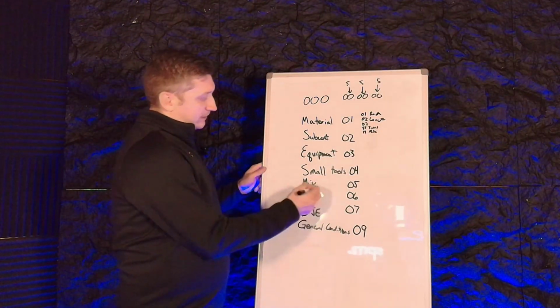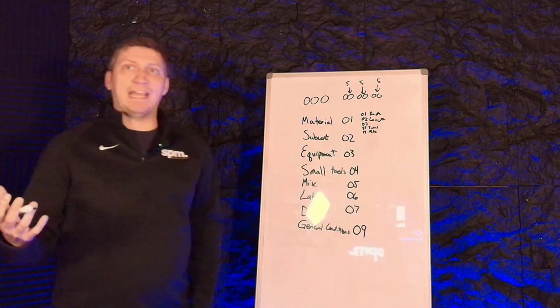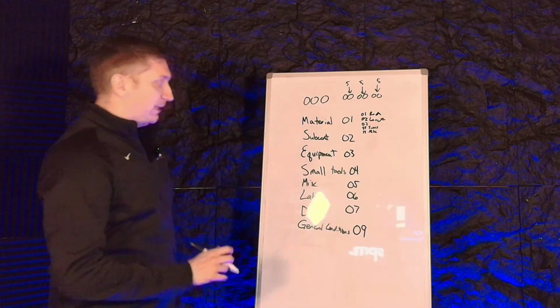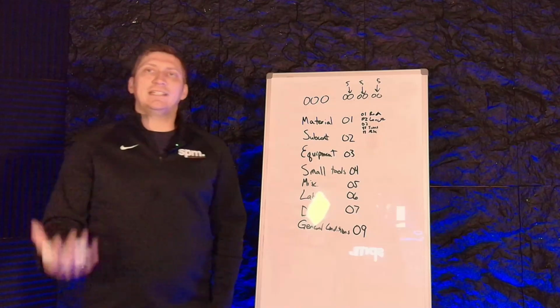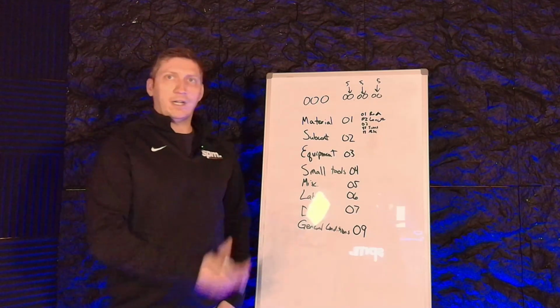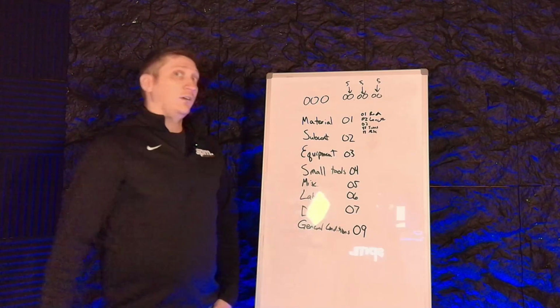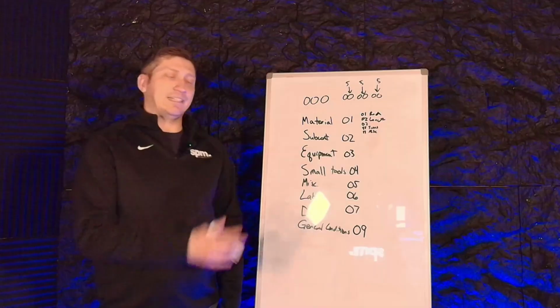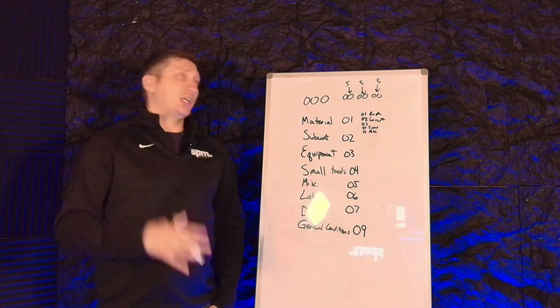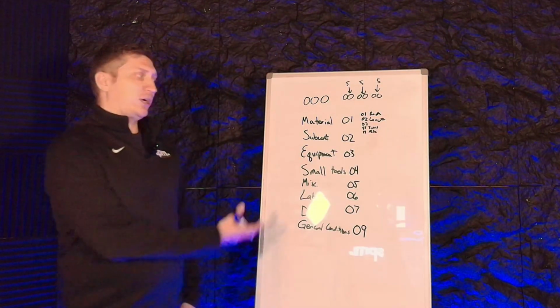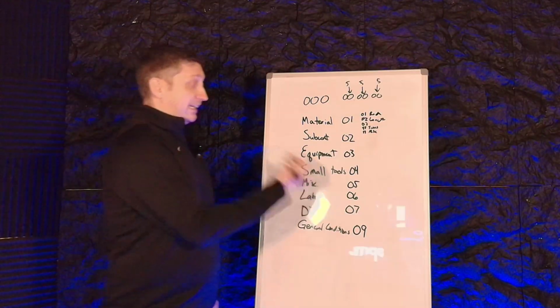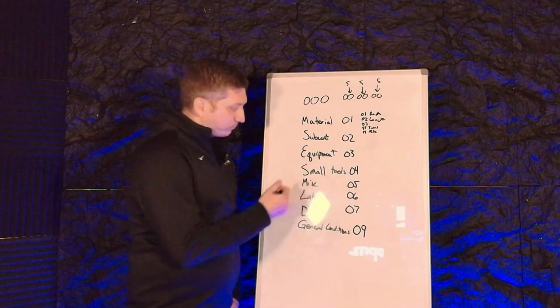This bucket for miscellaneous, in general, everything should fall into any of the other buckets. But the way I have that set up for our system is if somebody doesn't know what it goes to, they put it in there. If we ever see a number in that bucket, we know it's a red flag. Let's go fix it. Kind of like people's check with accountant buckets that they have in their general ledger. It's just for a project. So we can at least assign it, but then come back and fix it later.